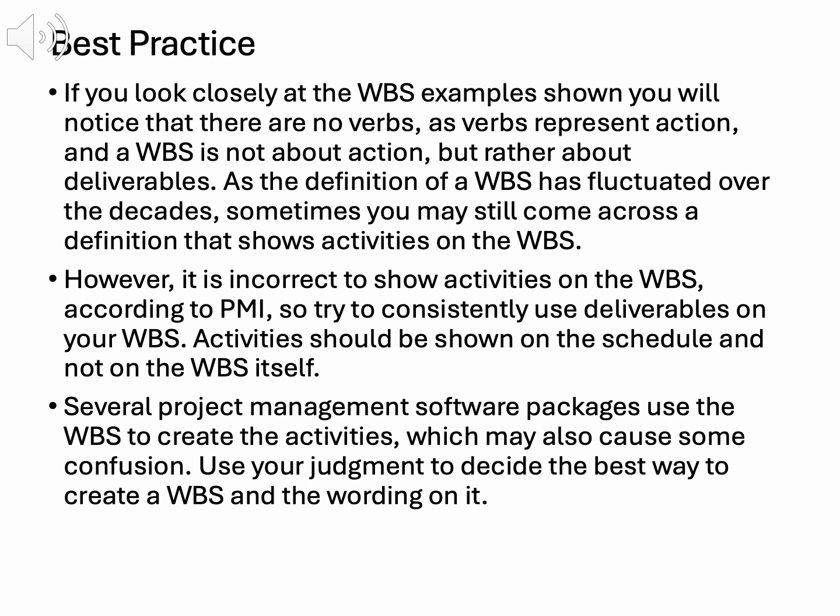A key best practice is focusing on deliverables, not activities, in the WBS. Deliverables are tangible outcomes, like a survey report or course materials, while activities, like conduct survey, belong in the schedule. This distinction, emphasized by PMI, ensures clarity. For the just-in-time training project, the WBS lists deliverables like needs assessment, not tasks like send survey.